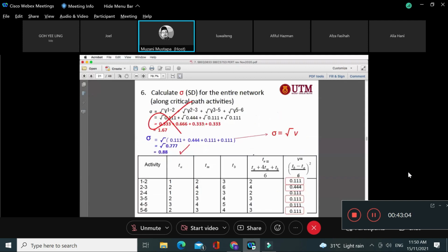Okay, now point number 6. Don't worry if you see why I crossed it out so big, because this is where the most mistakes happen. If you compare, this one is a variance, and you plus another variance. But now you see this is the total of variance. So you add all the variances, and then you take the square root. This is the right way, right?